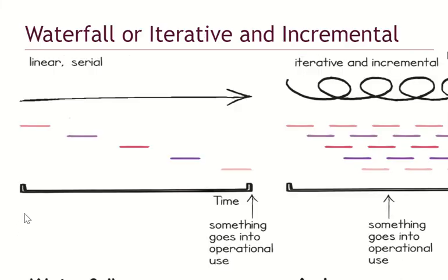Okay, when you compare Waterfall to Agile, another word for Agile is iterative and incremental. Iterative means you are doing it in phases, or in batches. You decide to break down a project of 3 months into what can be achieved in the first month, and then get feedback to be able to add more features if required to go to the next stage.